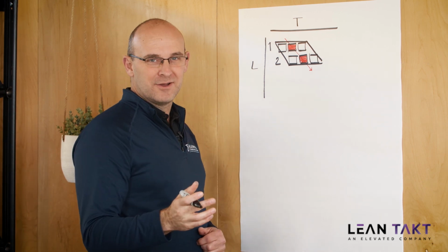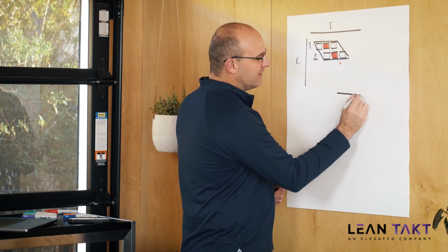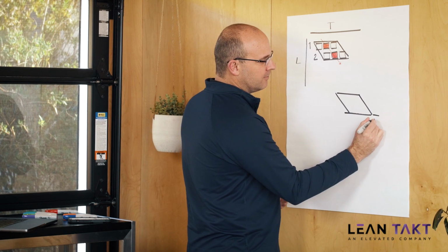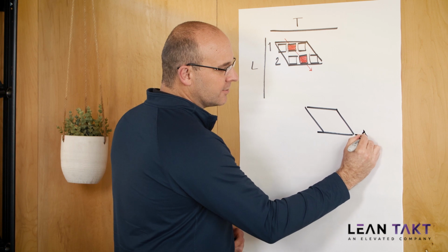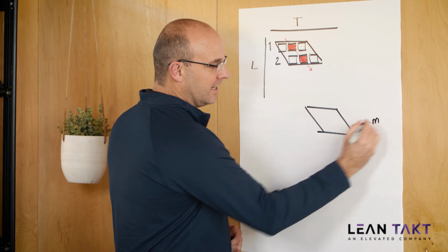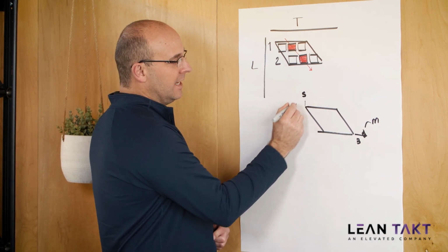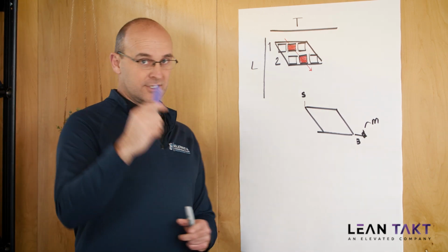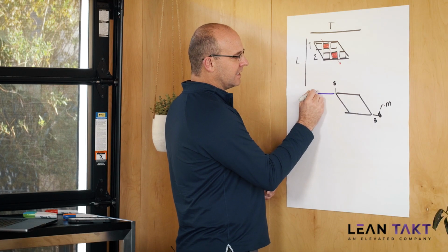And what's interesting about every one of these phases, it's really kind of a cool concept, is that every phase on a construction takt plan will have a buffer at the end based on risks. It will have a milestone that it's tied to for that phase, which I really like, so I'll put an M right here. And it will also have your start. And one of the things that I really like to do when interacting with phases in construction, let me write this in purple, is I will pull plan this phase about 3 months ahead.